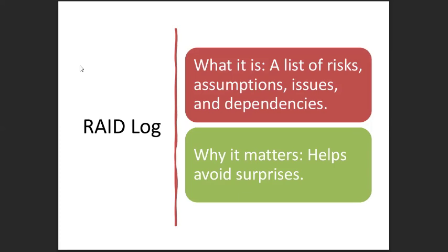So we had mixed material, and we are unable to use those items, they become bad, or like cement, they go stiff and we're unable to use it. We are losing in that instance. So we need to put mitigation plans in place. If we're mixing cement, we should mix either in an enclosed environment where we can reuse or recycle. We should mix quantities that we are able to use per time, just mitigating risks in order not to ensure that incidences or surprises come and impact this project.